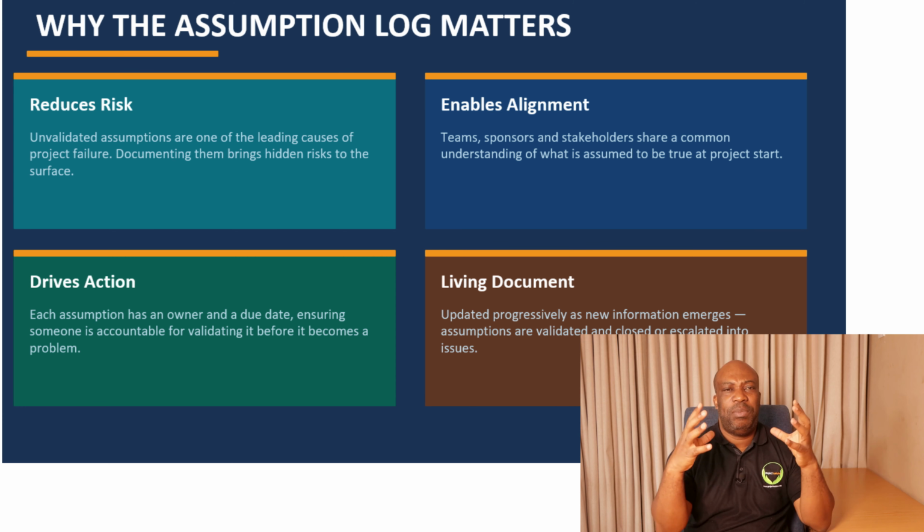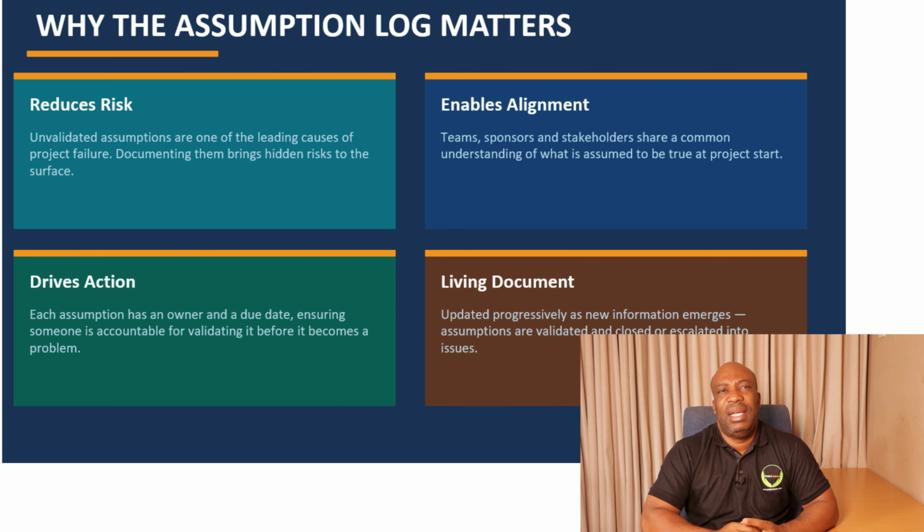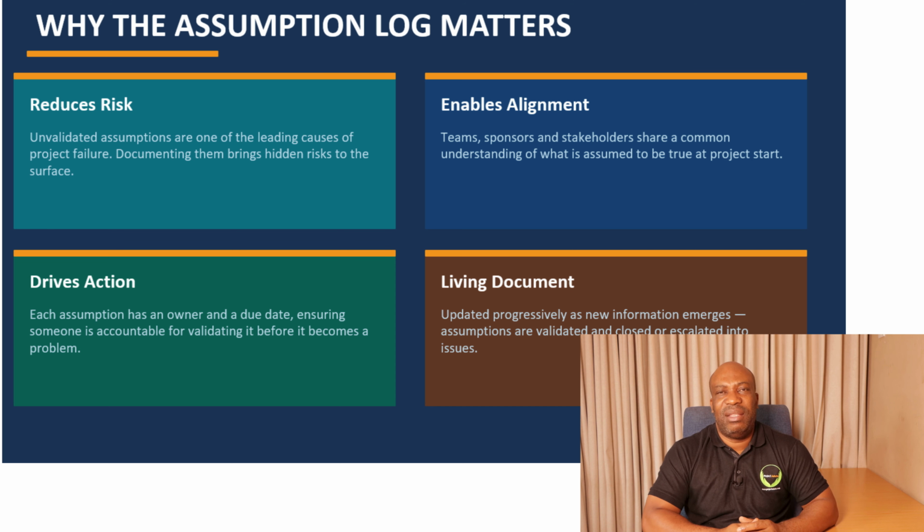Then, especially during the initiation stage, where you're creating probably a project charter, or you're identifying some stakeholders, it's also very important to use assumptions for alignment, because either the organization's senior management or program managers or portfolio managers want to appreciate what was the basis of your estimates, what was the basis of your documentation, what was the basis of your requirements collection, as an example.